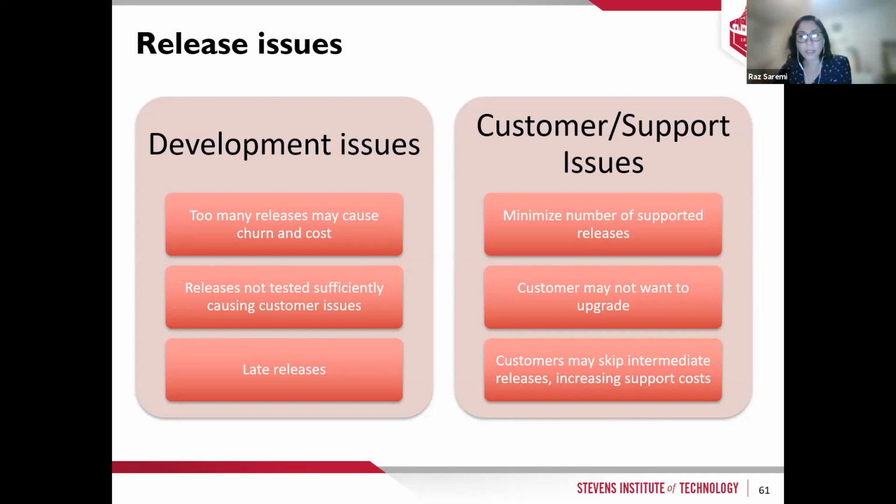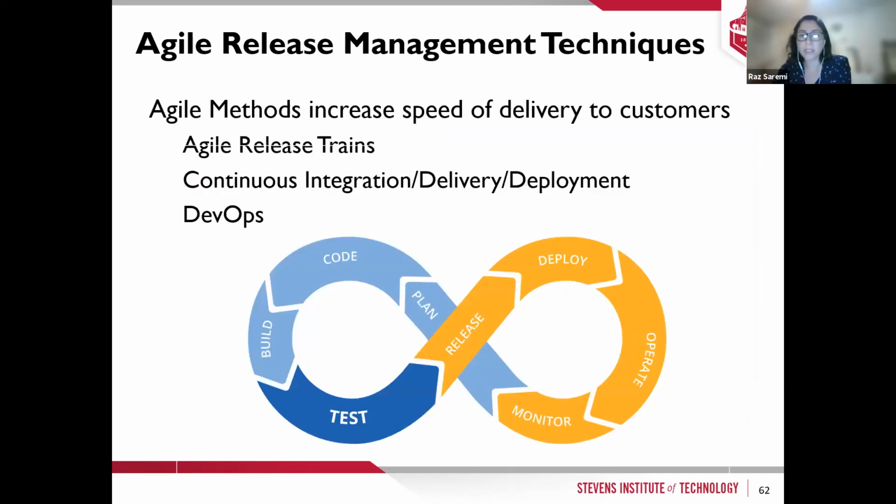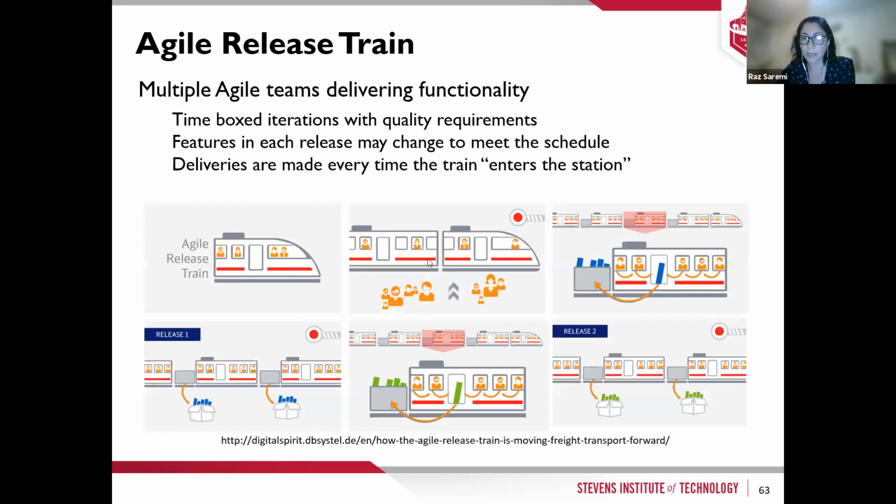In Agile, the release is like a train. Every time the train arrives at the end of each sprint, each scrum, there are some new tasks that go in and the release comes on top of that. So we have a train where every time I have a new pack of the release going on and a new pack coming out. When it's coming out, it is a new release. The one that is going on the train is what I want to work on for the next release.